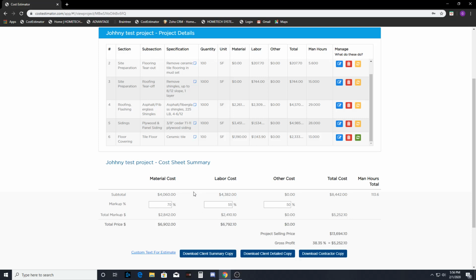Now, an awesome thing that we like to do is we include in our labor costs tax, FICA, and insurance, true costs of running the business. Uncle Sam wants his percentage for you having that employee. You always have to pay FICA and insurance too. And then for material cost, your markup in here also helps cover your handling of the actual materials as well.